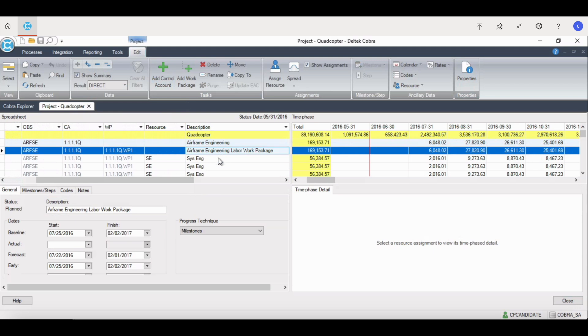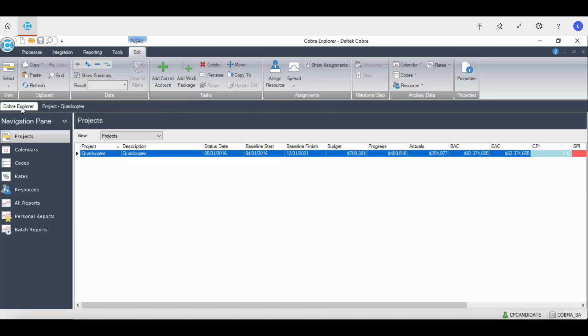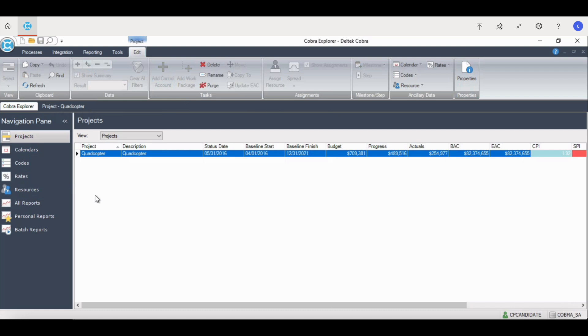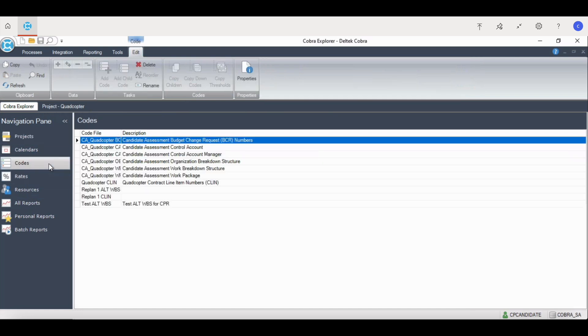Calendars, codes, rates, and resources are all referred to as ancillary files in Cobra. Ancillary files are Cobra objects that form the foundation of the Cobra project. A Cobra project cannot be set up until ancillary files are created. These files include a project's calendar, codes, which include WBS, OBS, CLIN, CAM, rates, and resources.